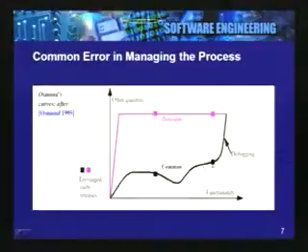Now, as a project went on, suppose there were early releases before the project actually completed, and these points indicate early releases. What normally happened was a lot of functionality was added initially, all the way up to the point that the project came to its close, and then all the testing and the debugging got done in the last part of the project.